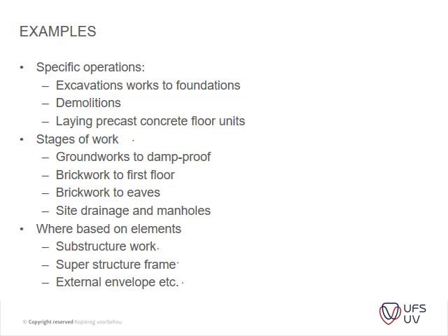You can structure your method statements in any of these three ways, but it's just to keep a logical flow of it. What the guys usually do, what I've seen and what I usually ask for, is on your program, do your method statements in accordance to your program. So for instance, your excavations or your site clearance, start with your site clearance method statement first, and your excavations first, and so on. Okay.